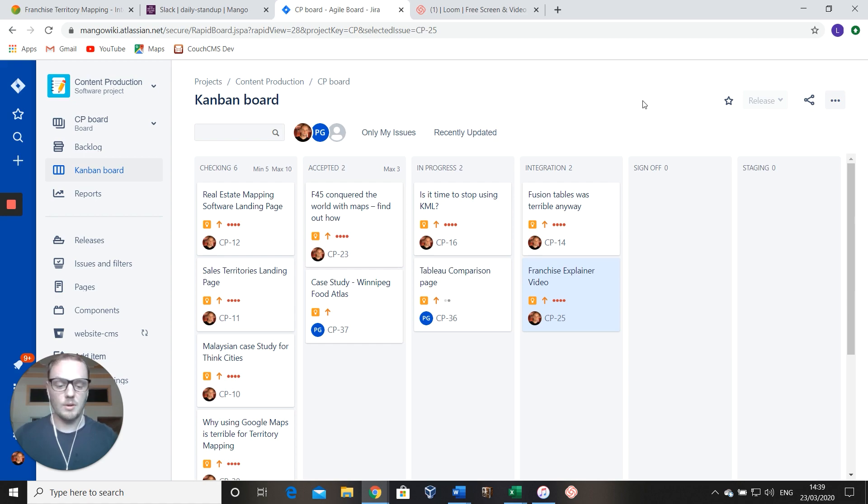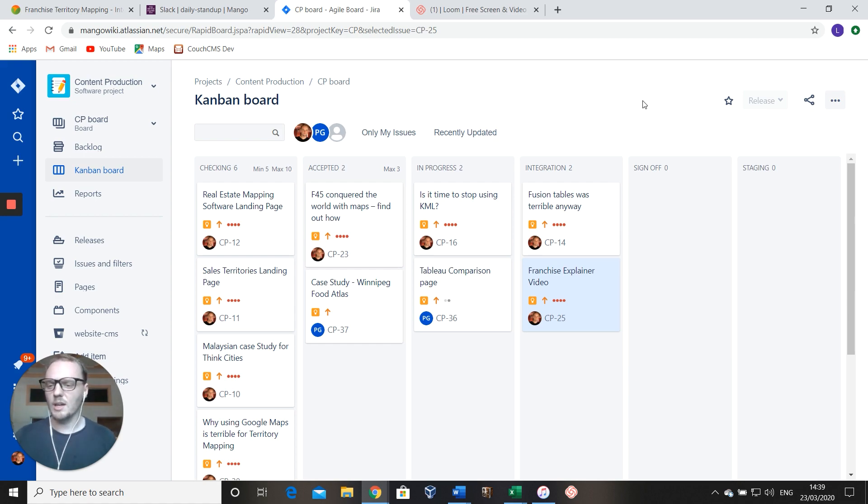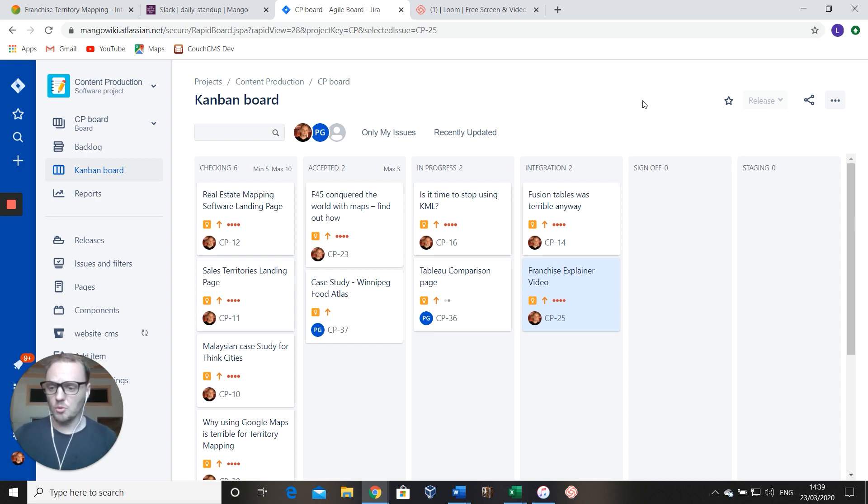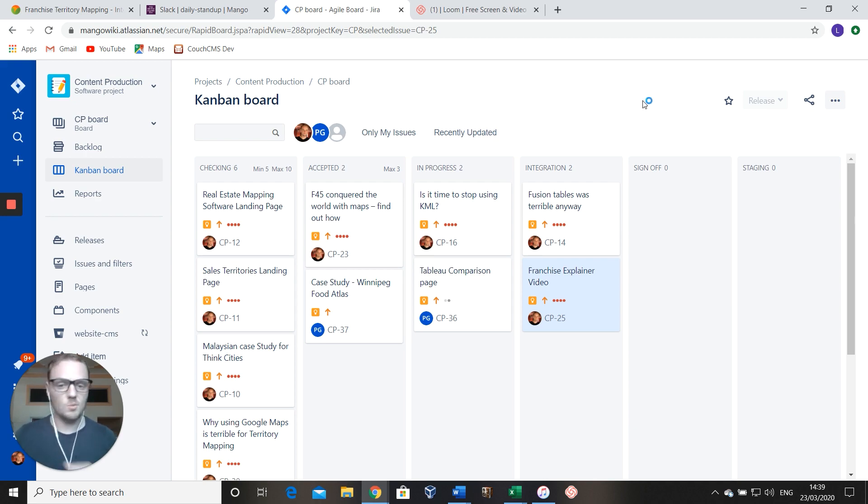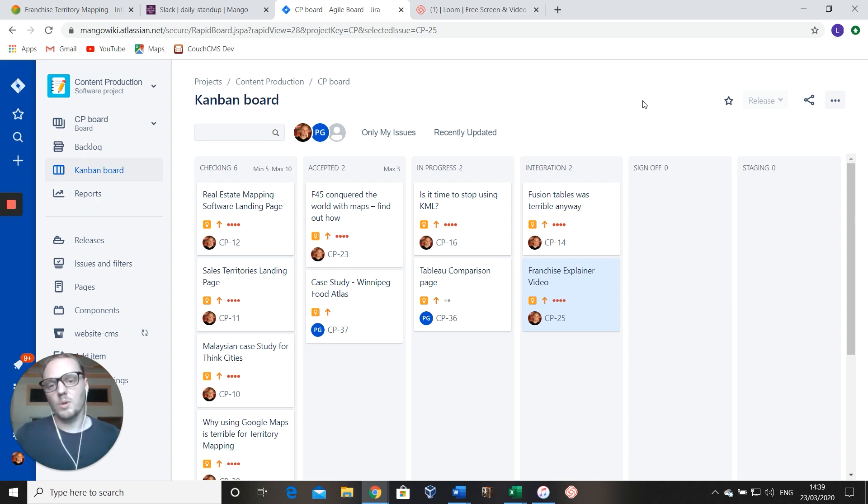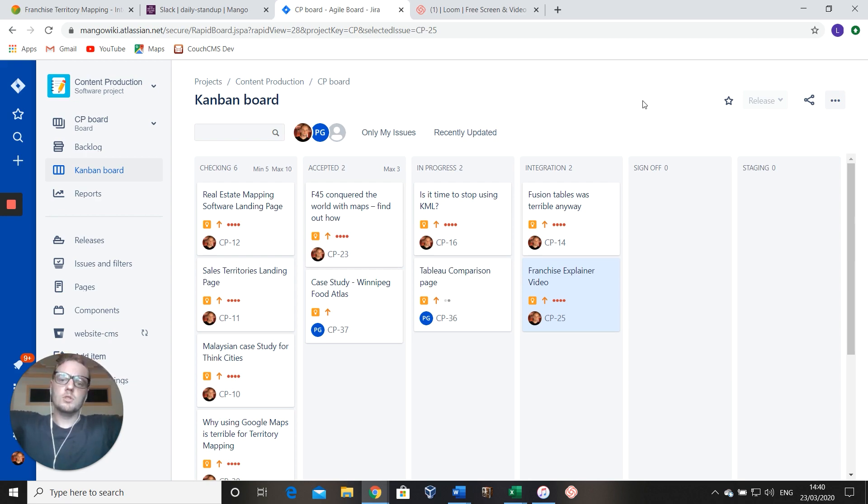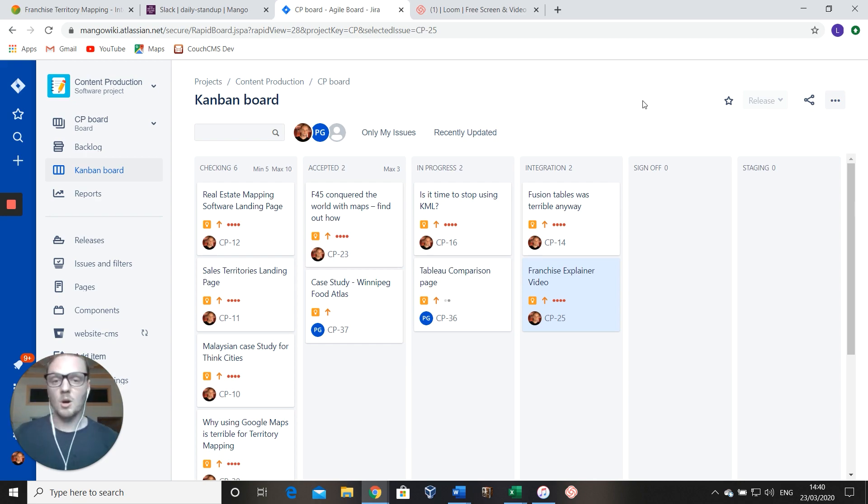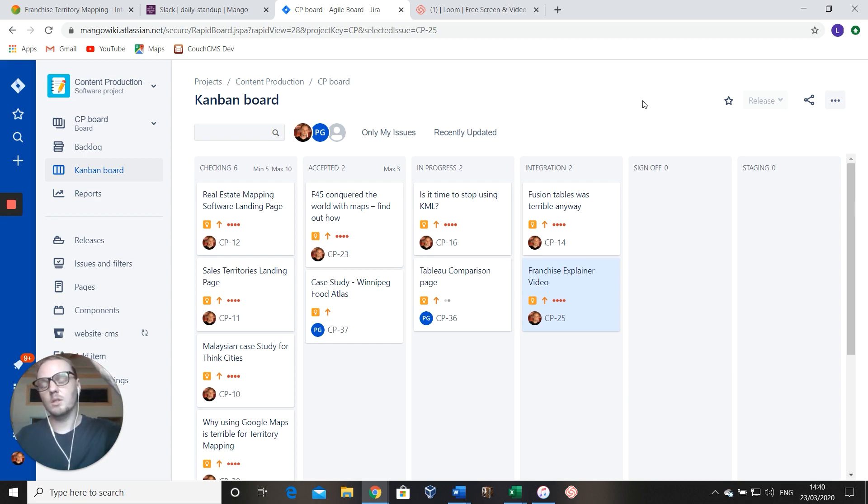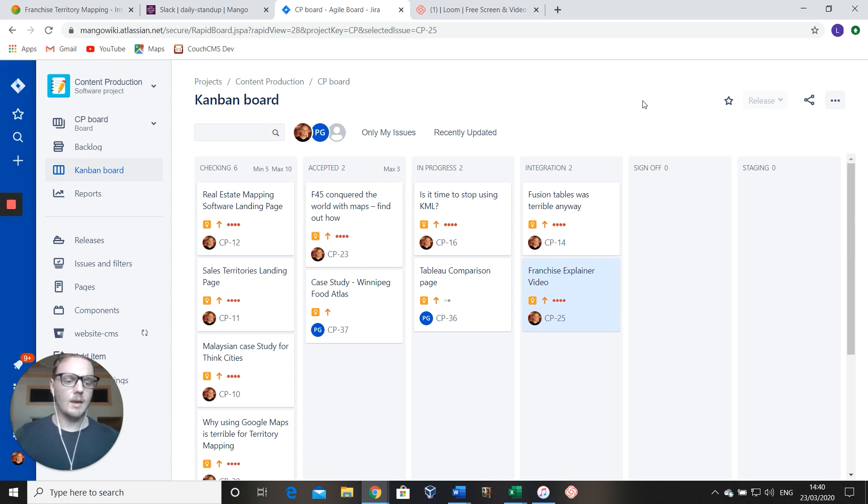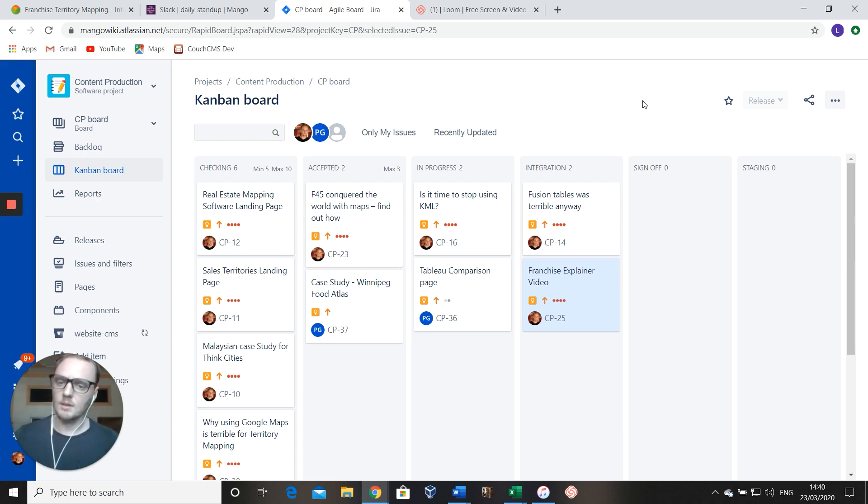It's for breaking down very large, complex pieces of work down into smaller stories and tasks. How we use it: we use it for marketing, we use it for content, we use it for software, we use it for everything. We come up with a larger piece of work called an epic—so that could be a marketing campaign—and then a smaller sub-segment of that would be the digital component of that marketing campaign or the design element, and that would be a story.